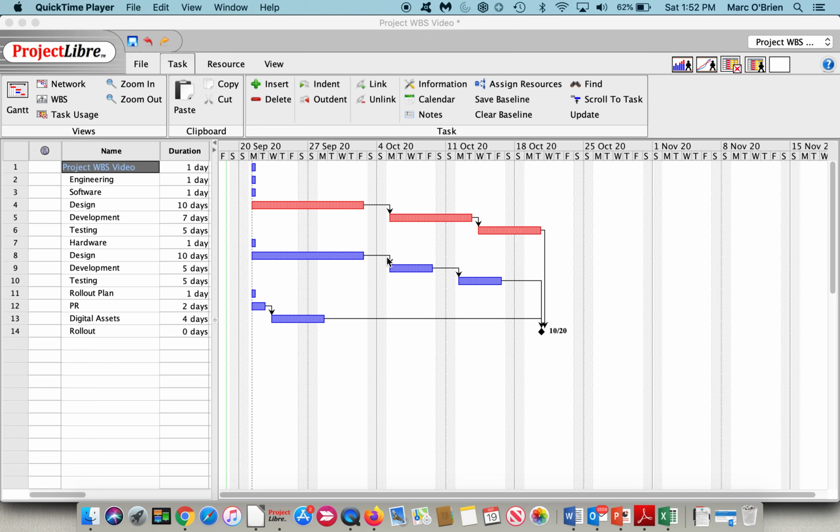As the project progresses, the WBS framework is used to compare schedule and cost performance with the budget established for each level. The cost data rolls up the WBS tree and summarizes at each level of the structure. Cost accounts, variance, earned value can all be tracked, and it should be tracked at a measurable level based on the progress and responsibility assigned, and is an effective tool for reporting purposes to stakeholders or customers at certain summary levels. Let's take a look at the WBS in ProjectLibre.